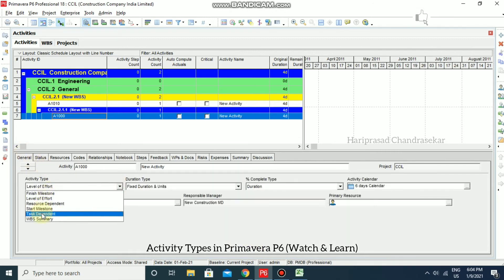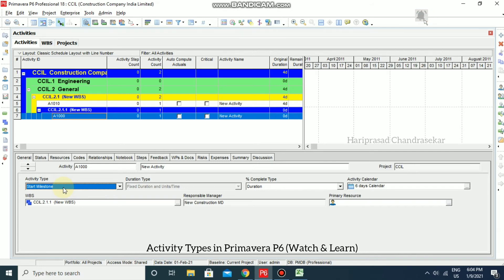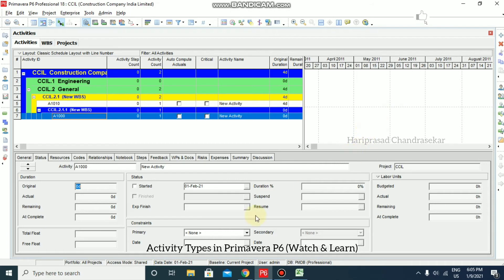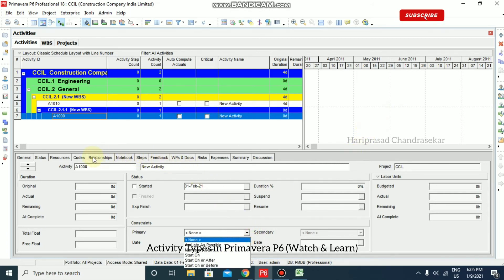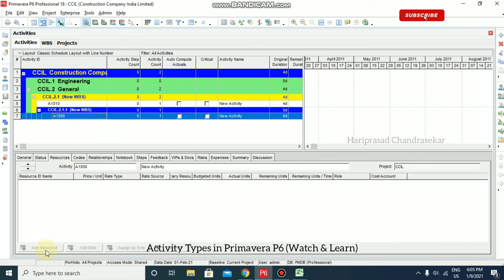Start Milestone is typically used to mark the beginning of a phase or to communicate project deliverables. If you set a Start Milestone, the activity will have zero duration and only has a start date. You can assign constraints and expenses, as well as work products and documents, but you cannot assign resources or roles to this activity type — the resource tab is unavailable for a Start Milestone.